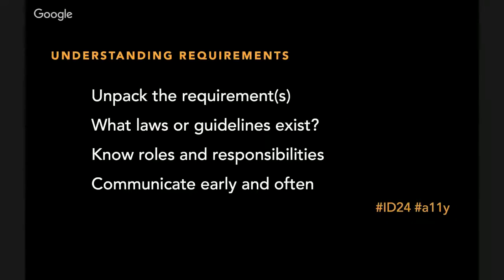When you can understand which team members are best responsible for which guidelines or use cases in making your site accessible, say color contrast and proximity issues being the domain of the visual designer, having that taken care of early on in the project, and then allowing the developers time to code things properly with respect to keyboard accessibility and understanding different ARIA roles and landmarks that need to be in play, that can help lighten the load and not have a lot of rework at the end.